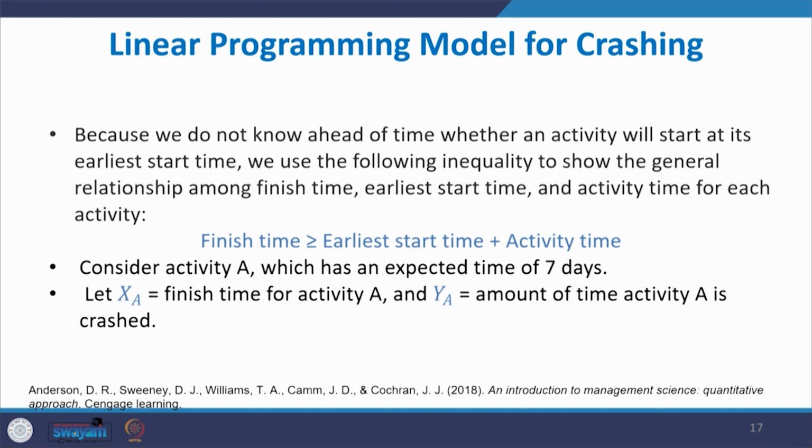Because we do not know ahead of time whether an activity will start at its earliest start time, we use the following inequality to show the general relationship among finish time, earliest start time and activity time for each activity. What is the general relationship? The finishing time is greater than or equal to the earliest starting time plus the activity duration time.